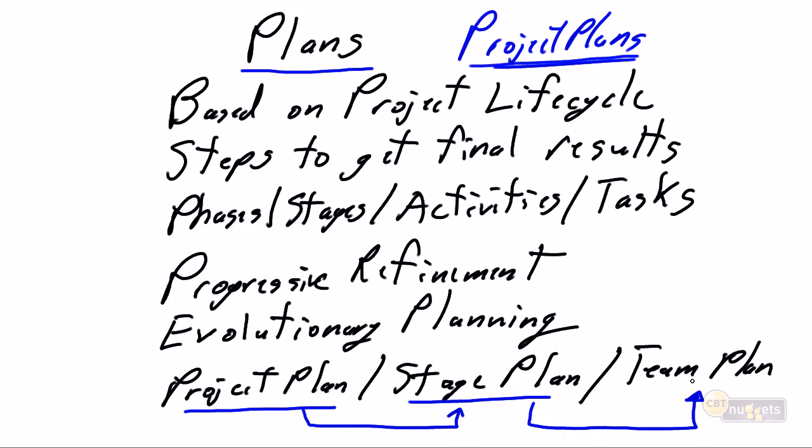So here is the team plan for Team A, and the team plan for Team B, and the team plan for Team C. So one of the key principles of Prince2 is multiple project plans to allow for our plans to be delivered at the level of detail appropriate for where we are. Overall project approach versus a detailed stage versus the day-to-day management of the team.